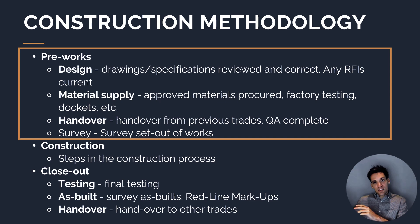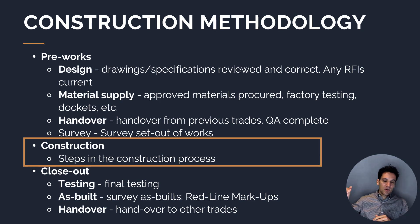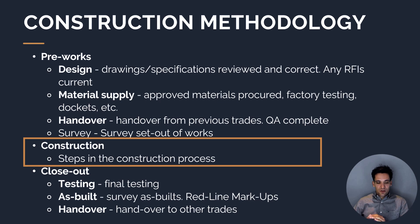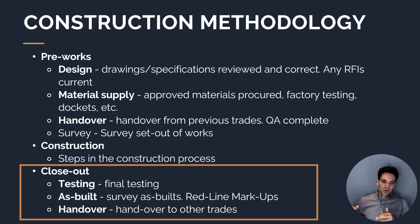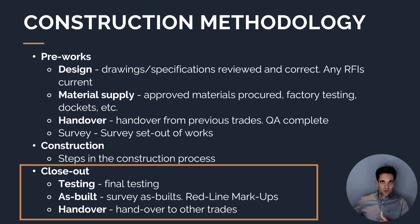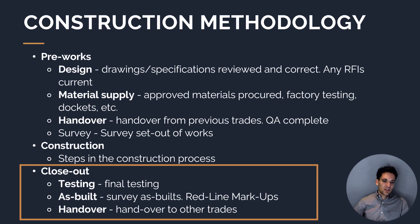Then we move into construction — step by step through the construction activities involved in the task, checking against each step what could go wrong. Then the closeout activities: any final testing such as concrete testing, documentation of as-built drawings or design changes, and handover to subsequent trades or final acceptance by the client. Those are the steps we want to document for every single activity.